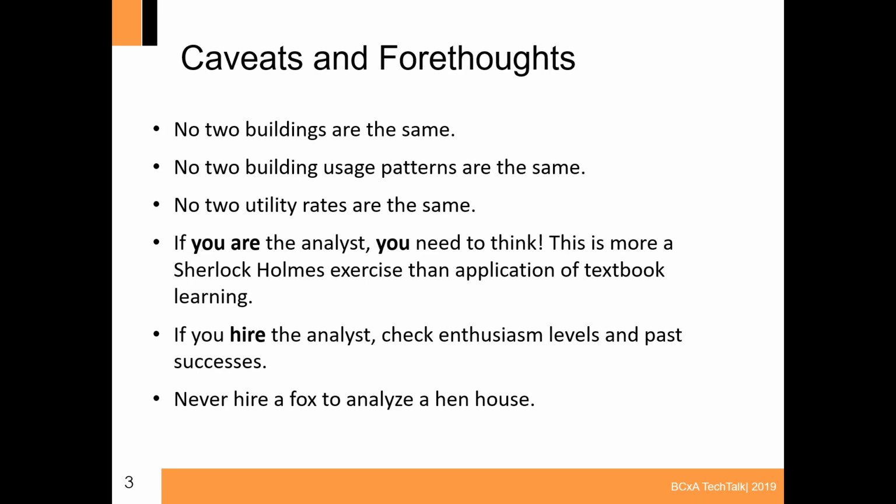If you're going into a project and there will be not just you doing your commissioning, but maybe you have a lighting engineering company or someone else going in, establish in advance who gets credit for what. Because chances are, if you're doing data analytics and your sub is doing data analytics, you don't want to end up in an argument over who found what. I've seen that happen before.